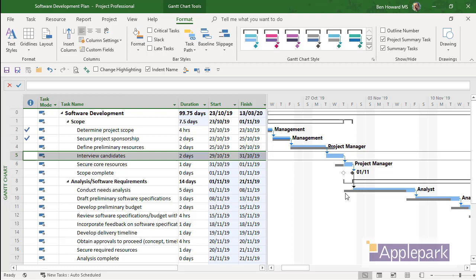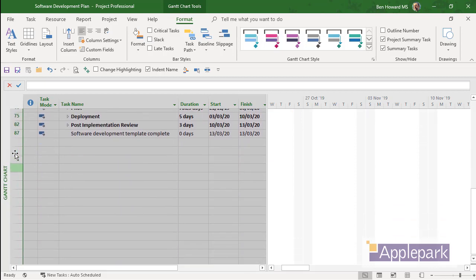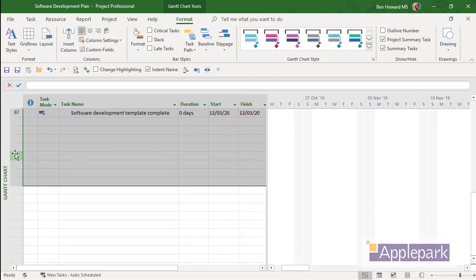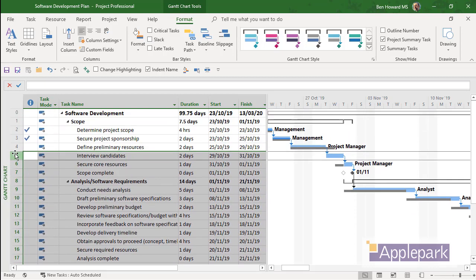So if Interviewing Candidates was an approved change, then I might want to take, or indefinitely I would want to take, this activity and add it to my baseline. So I'm going to highlight task five onwards down to task 87, and then I'm just going to add those into baseline zero. Let me see how we'll do that.